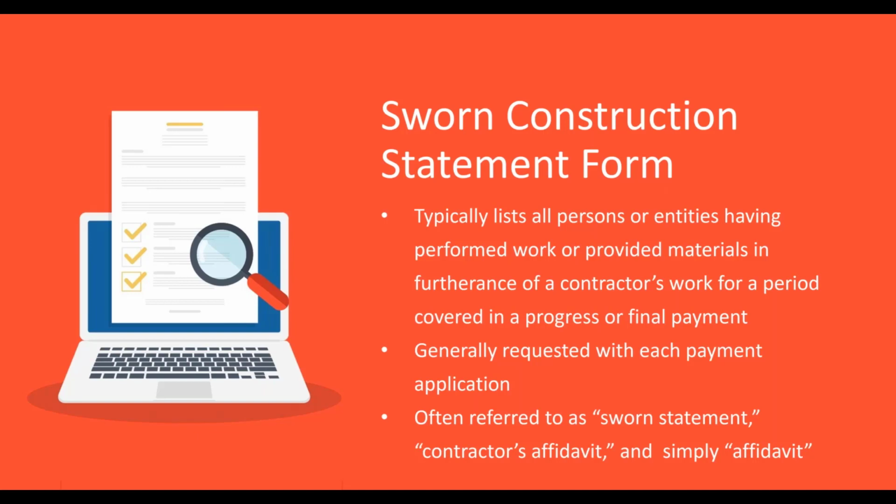I'll tell you, Sarah, in jurisdictions I've practiced in the past, I've not come across sworn construction statements like this, but it seems like a decent practice to use something like this on a project. And I know you're going to show us a sample of the form later. It definitely threw me for a loop when we first started talking about this, because I had never heard about it in practice. Yeah, that's interesting. I used to practice in Illinois, and I would commonly see them there submitted with each payment application. And in Michigan, the state has specific laws about sworn construction statements and what needs to be contained within them. Next slide.